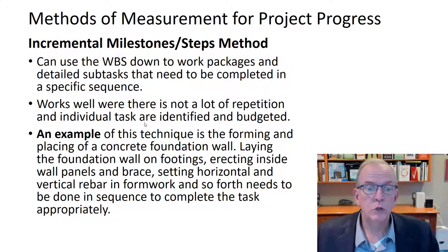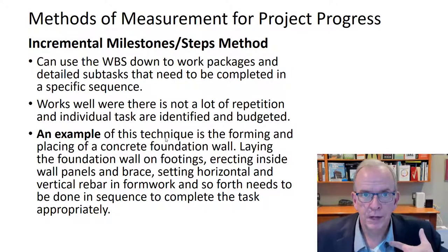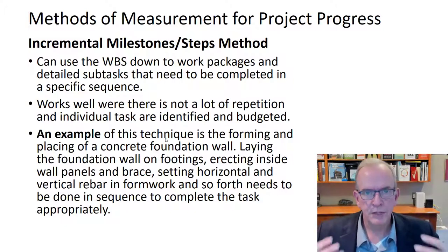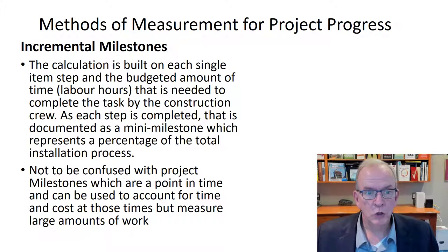Of course, on a lot of projects where you've got a lot of repetition, you might do it by cubic meters of concrete poured, and then that ties into all the forming and everything else that was brought about by it. Or the forming, going back to the units method, could be done by square feet installed. So there's different methodologies that can be used to determine that.